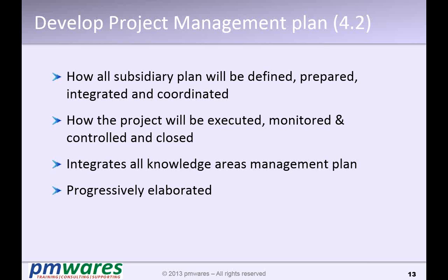There is a terminology called rolling wave planning. In rolling wave planning, we define a window of some duration, let's say 1 month. So if the window is 1 month, then for the next 1 month, whatever is coming as per the high level plan, we detail it out. That means we plan in detail in the near term, and at a higher level in the far term. Any work which needs to be planned after 1 month remains at a higher level. After 15 days, we move the window another 15 days, and whatever comes into that window, we again plan in a more detailed manner. Maybe for a 1-year project, you do it for a couple of months, and after that you may have the complete project plan. But the project will always be progressively elaborated, so you need to continuously revisit your plan and can improve it.